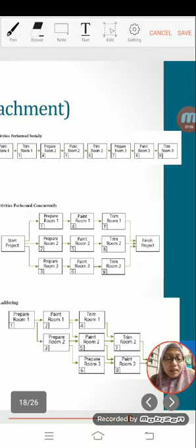So here, I want you to calculate: if we pay 1 person 50 ringgit per day, and 3 persons work for 3 days, how much do they need to pay compared to figure number 3? In figure 3, only one day they use 3 persons, another 2 days they use 2 persons and another 2 days 1 person.